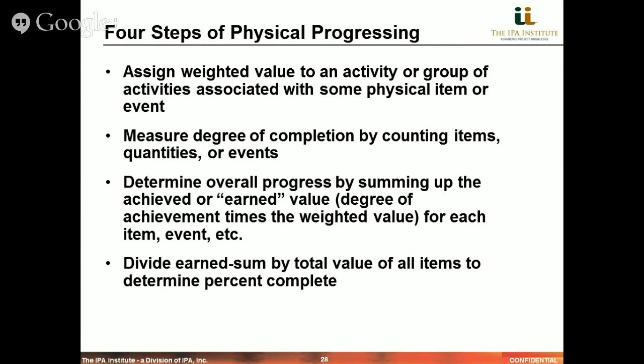And so you measure the degree of completion of that particular activity by counting the items or quantities or the successful completion of the event. So we have added some sort of weighted value in terms of units of currency, whether it's dollars or euros, and then we measure that percent complete by counting the number of items.